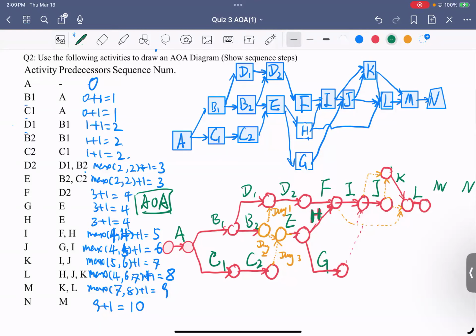For example, if this is your ordered concrete, and this is where you place your concrete for phase 1, and this will be where you place your concrete in phase 2. You have a limited resource. You cannot do the same 2 phases at the same time. So it's better to have it, even though the relation here is already contained there.